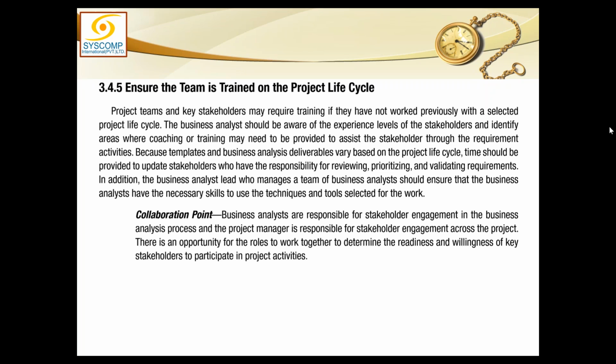The collaboration point here is that business analysts are responsible for stakeholder engagement in the business analysis process, and the project manager is responsible for stakeholder engagement across the project. So engagement of stakeholders in business analysis processes or activities is the responsibility of business analysis, and engagement of the stakeholders in the project is the responsibility of project management. This is an opportunity for the roles to work together to determine the readiness and willingness of key stakeholders to participate in project activities.